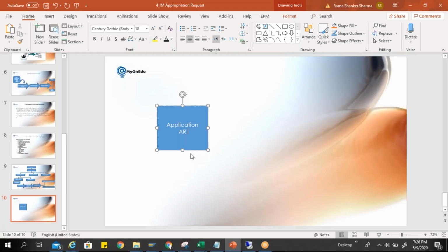And apart from that, whenever you are uploading the same document at different places in the system, it will create a new document. For example, you are attaching one document to the appropriation request, and in the next step of your process you need to upload the same document for the WBS also. So you have created one copy here of the same document and another copy you are going to create here. So it means the duplication of data, and you are not able to use that one.